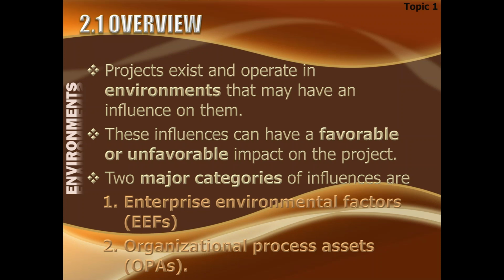Why don't we be proactive, and right from the beginning of the project consider those enterprise environmental factors and organizational process assets? Now, there are two main categories which influence. One is the enterprise environmental factor and the other is the organizational process asset. Enterprise environmental factors are the factors, not the documents actually. These are the various factors which impact a project in a positive or negative way. These factors could be internal or external to the organization, and they are not necessarily documentary in nature.